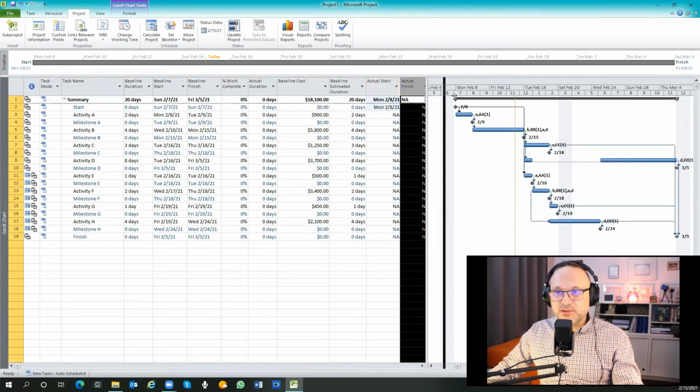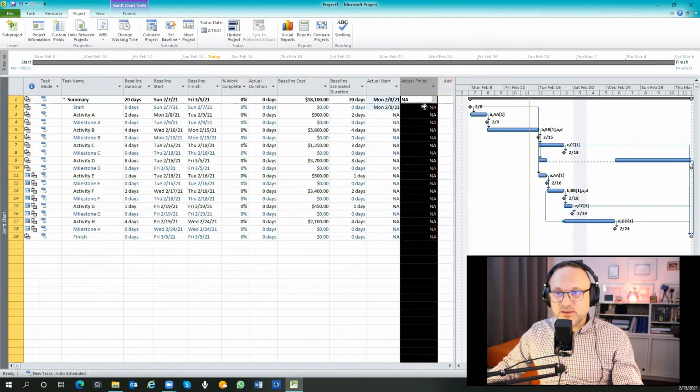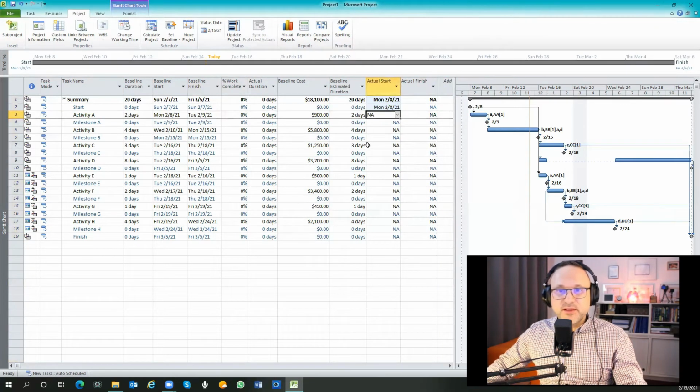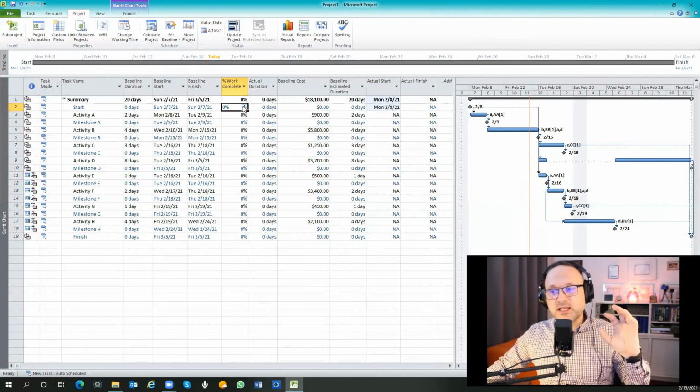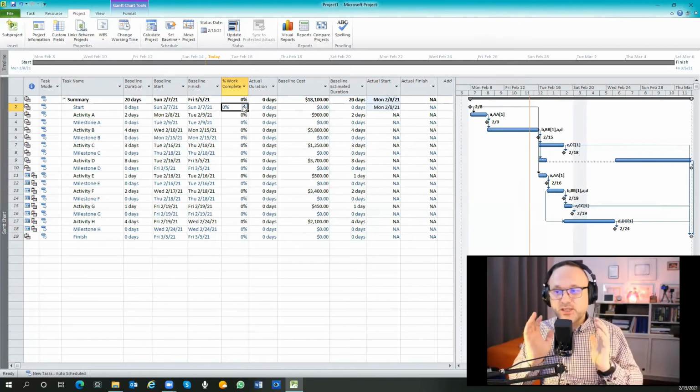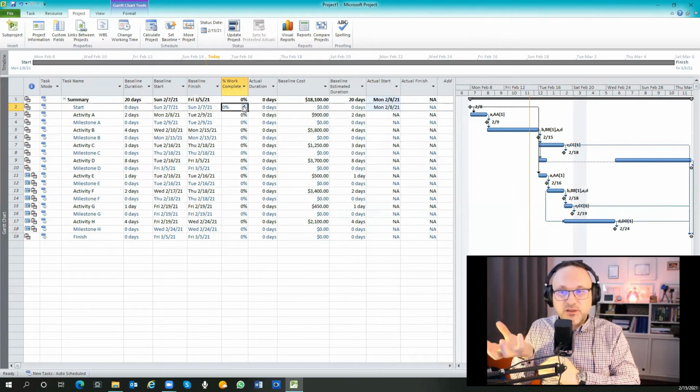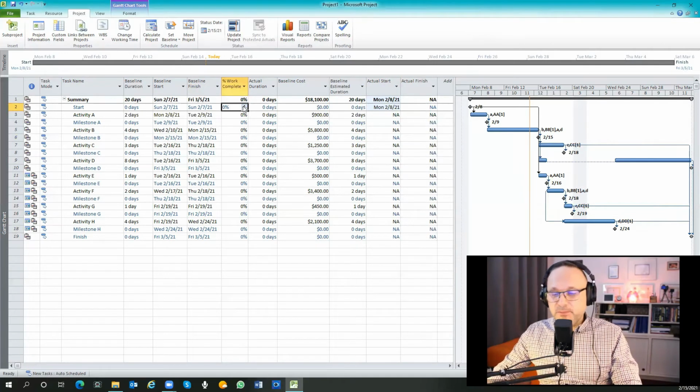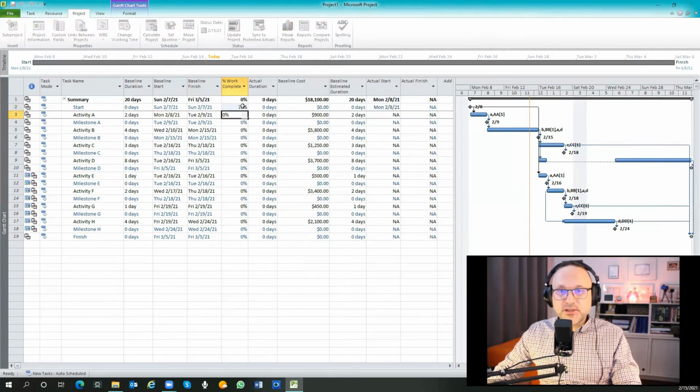Don't worry if it's only hashtags because the format. Okay. So I already started this activity, and the percentage completed, we said, during the actual percentage completed, you consider it according to the estimation, according to the rules you put in the attribute, what are the weight of each document or each work done here. So from activity A, I could say that 70% has been finished.